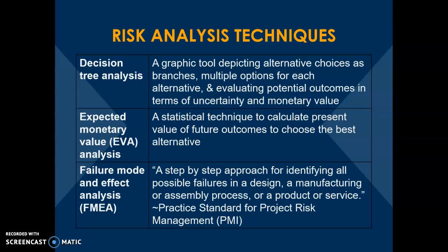Failure mode and effect analysis, or FMEA, the PMI defines as a step-by-step approach for identifying all possible failures in the design, a manufacturing or assembly process, or a product or service. So essentially, this is a very detailed analysis of trying to look at everything that could possibly go wrong, identifying all of those potential failures and coming up with a plan to deal with each and every one.